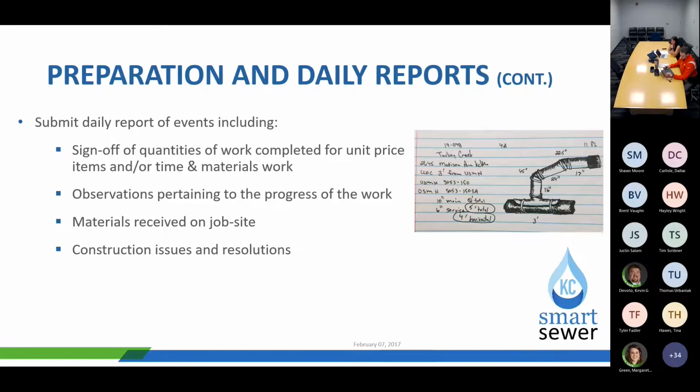Those types of materials that are being delivered, and on stored materials. That's been a big one lately, the stored materials. Make sure you get photos and get them uploaded to the report. Note exactly on the report what was delivered today.